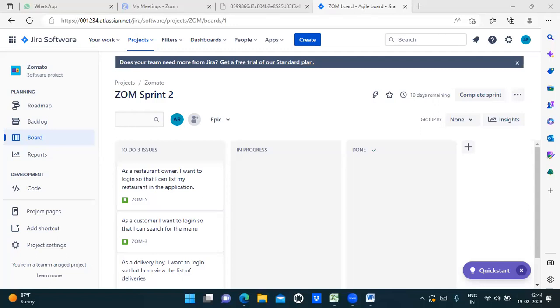But once the sprint has been discussed and started, what happens is, in the sprint planning meeting, the timing, the duration, the user stories, and the story points are all calculated. And once you keep adding new user stories to the sprint, you cannot deliver in the time that you have promised to the client. So here quality is very important. Instead of adding new user stories to the sprint, start new sprints in parallel. That way you will finish faster.